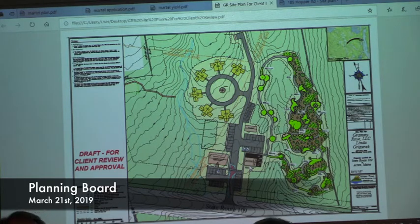Is this proposal all proposed to that wetland? Right, there's one wetland that's going to be impacted right in the middle of the driveway. And then these wetlands, there will be no impact on those wetlands. There might be some slight grading impacts, but we're going to be well under the 4,300 square feet that's allowed without a permit.